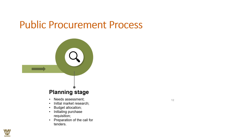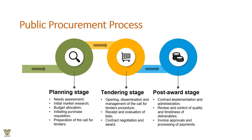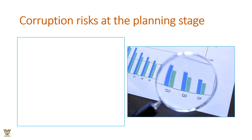Public procurement involves three stages: the planning stage — covering needs assessment, market research, budget allocation, and sustainable development goals; the tendering stage — opening and disseminating calls for procedures, receiving and evaluating bids, and contract negotiation; and the post-award stage — contract implementation and administration, review and quality control, timeliness of deliverables, invoice approval, and processing of payment.